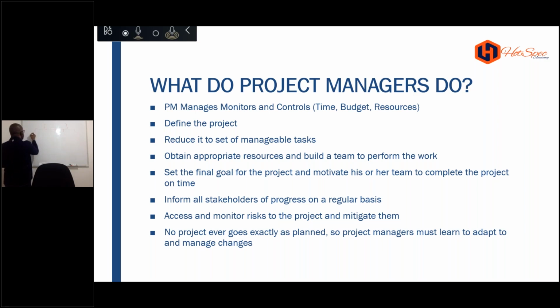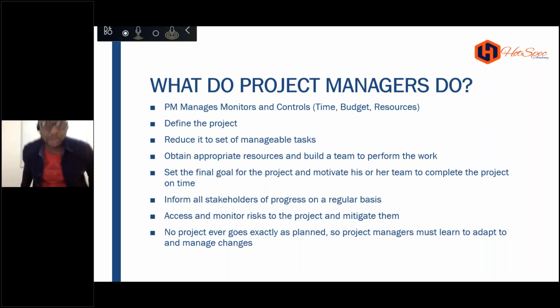Each phase can then be broken down. So I'm going to have something like this a lot as a PM. You're going to have a hierarchical structure. Now, how do you do a hierarchical structure? That's going to lead me to tell you as PMs as well, you need an understanding of some tools. Your Microsoft Visio or any other tool, you could use that to draw within your project documents, like an organizational structure. I could do a brainstorming in there. My brainstorming can give me something like this. I can transform my brainstorming into a work breakdown structure.